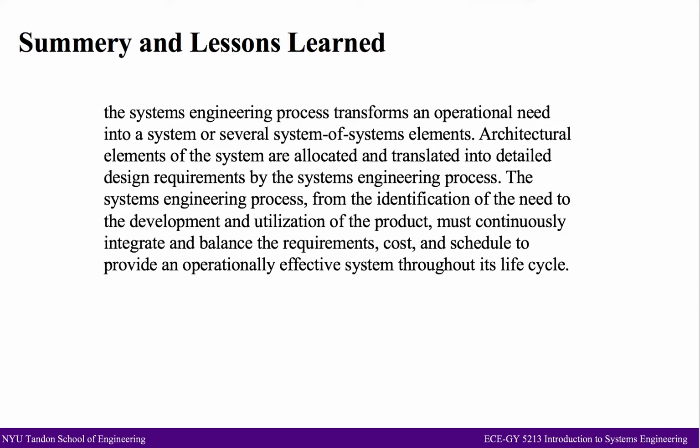Despite the huge amount of evidence of serious problems as the development of the visible infrared imager radiometer suite proceeded, the program executive community did not effectively challenge the IPO's assessment that the problems would not delay the first endpoint launch or exceed the program's management reserve.